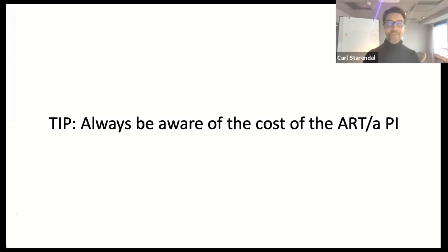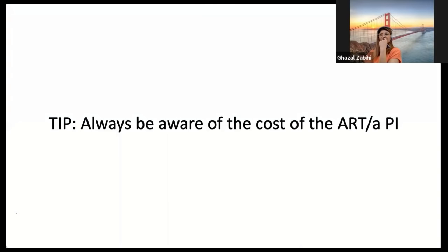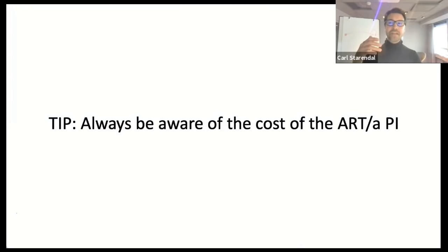Then let's continue. So the cost structures of the ART. I want to understand the cost per PI. It's a brilliant little piece of number to have in your pocket. And you don't have to have the exacts, because you can reversely start calculating. Say you're using story points, so we're able to produce 1,000 story points per PI, and this feature is 500 story points. So building this, I'm talking at least 5 million. That's interesting. This can be used for discussions and prioritization. These are not exact numbers, but getting a sense of is it millions or billions would definitely drive decision making on many levels. So that's my practical little tip: I would always start digging for this number.